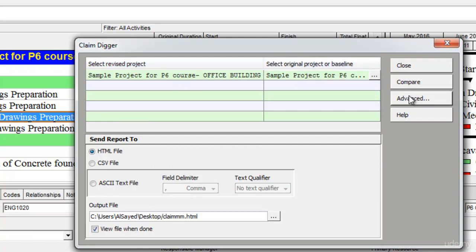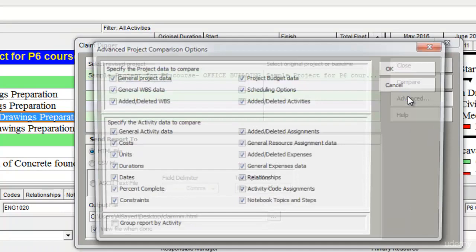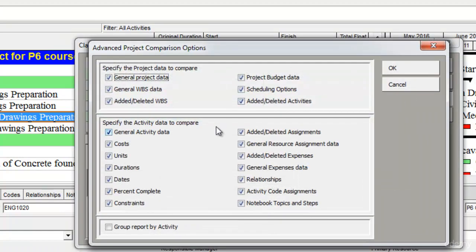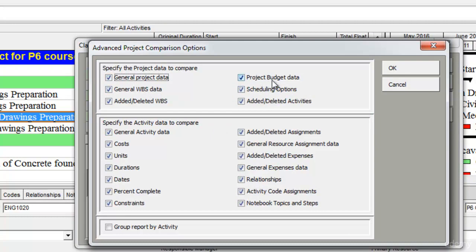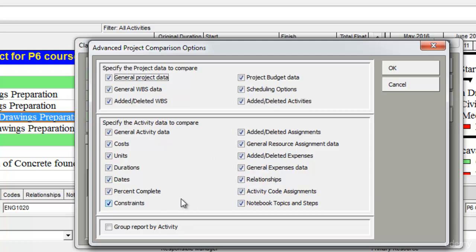If I go to the advanced option, I can select the type of data I want to compare. For example, if I want to compare general project data or project budget data or scheduling options that have been used or added deleted assignments or changed relationships, activity codes, there are a lot of options which I can select or deselect according to my requirements.